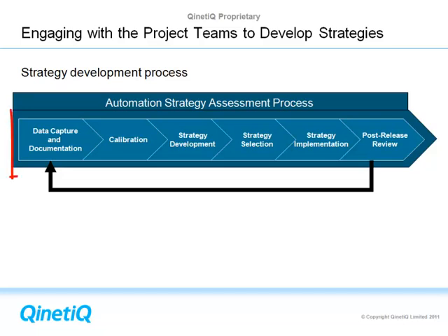And the way that the champions have been working with the project teams is, first of all, they have a quick meeting to establish the initial conditions. So what's the application like? What's the release like? What is the staff competency like? And then there's a phase of calibration to make sure that the model represents realistic historic behaviour.